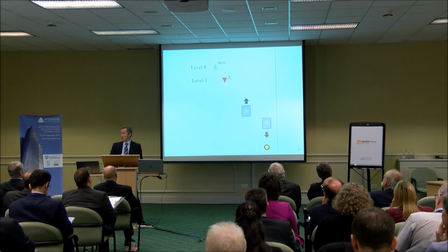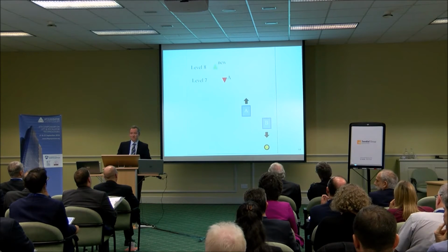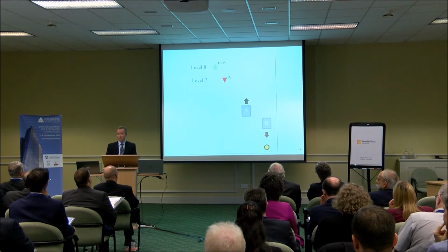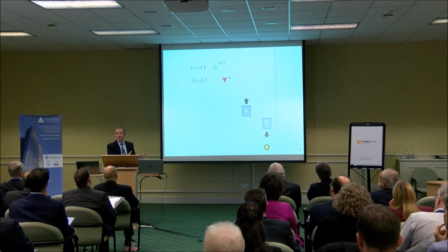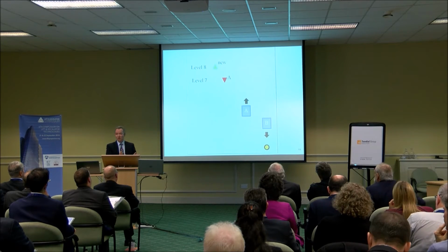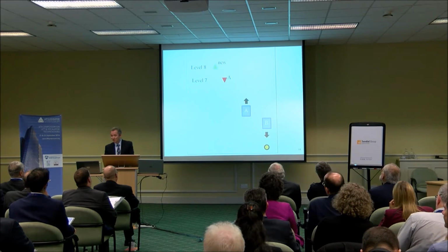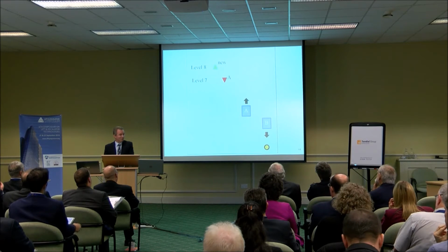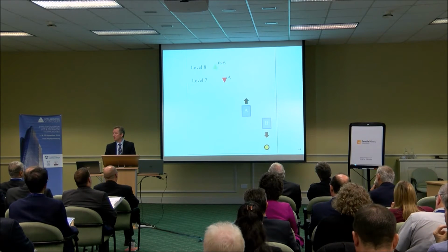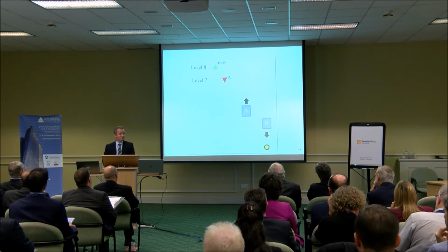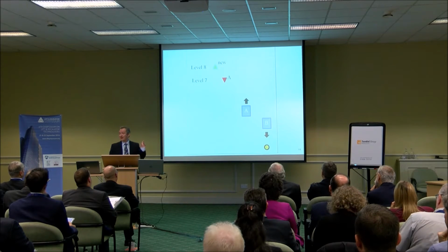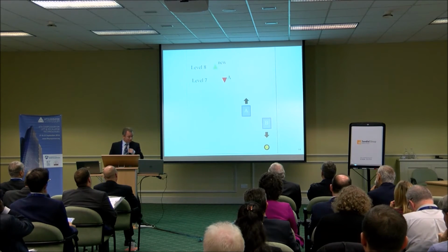And things do go wrong, and in the commissioning of some of the systems I've been involved in, these subtleties have gone wrong and made a big difference. And unless you spend a lot of time and money really commissioning those systems in detail, you get errors which quite often will remain for the lifetime of the installation, because they're very difficult to find out after it's installed.